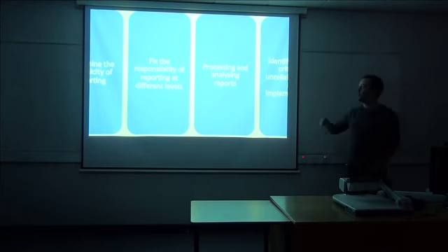Do the project results justify the inputs? We've put £1 million into reducing waste in this project, but we've only reduced waste by 10%. So is that a good use of resources? Cost-benefit analysis. We need to be honest with ourselves and say, maybe waste minimisation wasn't a good thing to do. We spent £1 million for nothing. But you can only understand this once you've looked back and evaluated, hindsight. And are there any ways that the project activities can be refined to achieve better outcomes?